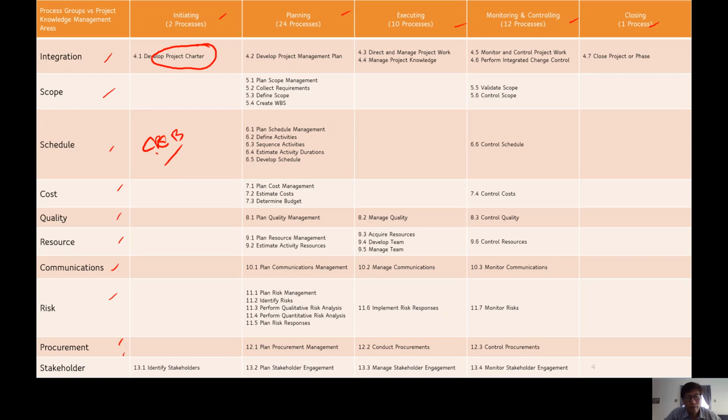The CCB, Change Control Board, would be the customer and senior management, but not the project manager or the team members, for them to deliberate whether they need additional time, whether they want to approve the change or not, whether it's a useful change or not, additional time, additional funding, and so forth. So let the CCB decide that. There's some kind of mechanism or governance that needs to be in place, as part of the infrastructure before you venture into a project, right?